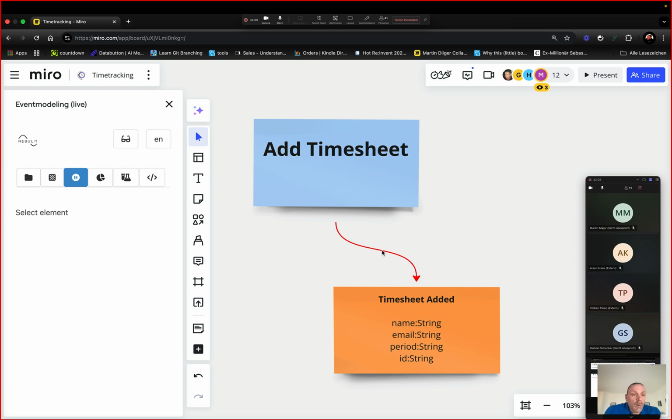And suddenly, our whole efforts to plan our current sprint are completely meaningless because the preconditions are wrong. The assumptions are wrong. And then we need to replan our sprint because the other team has its own priorities and they don't have time to provide the API for the email. And suddenly everything goes wrong. And nobody knows why the project suddenly costs double the amount of what we originally estimated, just because of wrong assumptions. And using the information completeness check here prevents us from making these wrong assumptions.